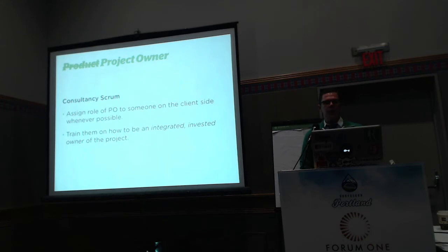Additionally, we have decided that because of this tension now with the client, where we're asking them to take on the vision of the project and to devote a ton of time to be involved, the product owner has to be involved on a daily basis. Sometimes you assign the role of the PO to somebody on the client side if they're available. If you do, you have to train them.